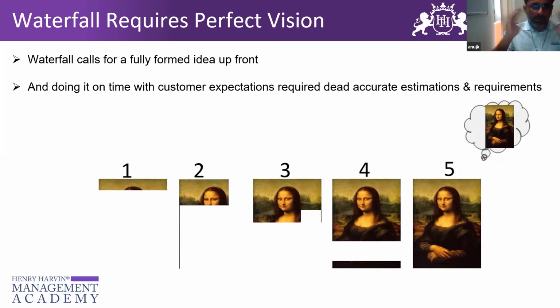Now, that understanding is based on what we are talking about today. So there might be a case where somebody talks about scaling. This is now a VUCA world, which is very volatile, very fluid. Things are changing, there can be a merger and acquisition. So the system was not built to scale. My design was limited to support 1,000 users. I sign it off. The company was doing good, they acquire somebody, now the user base is moving to 5,000. So your system is outdated. But I had given my sign off on 1,000 users. Any changes that I require will go through another phase of requirement, another phase of development, and the same cycle will go on. So that is where these sign offs used to come in.